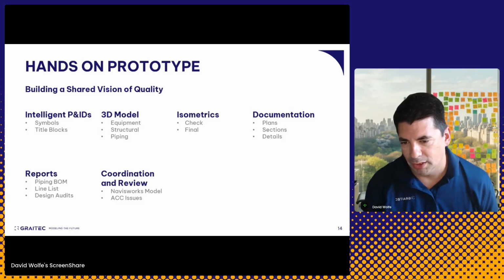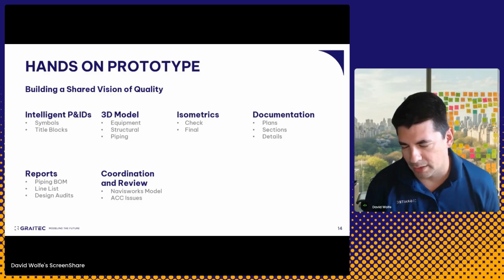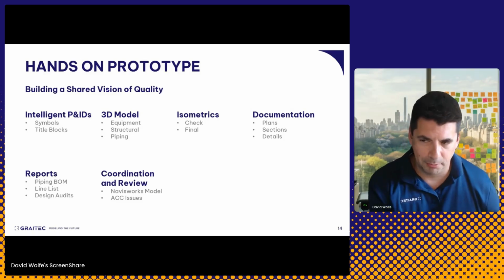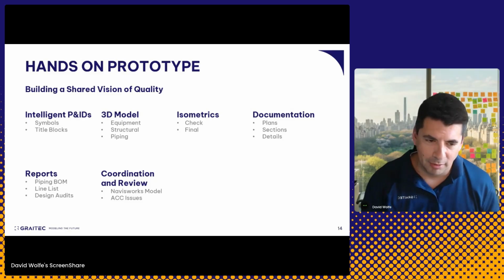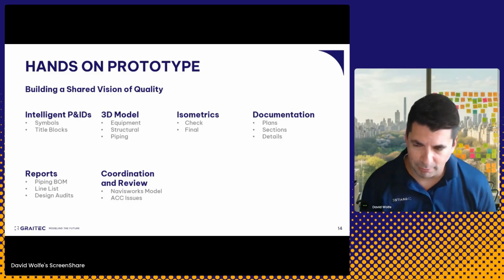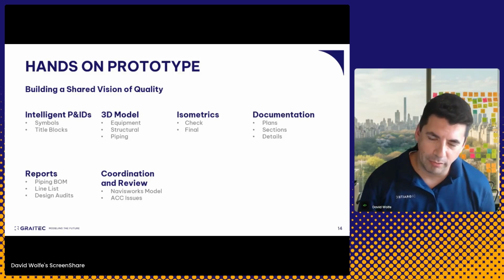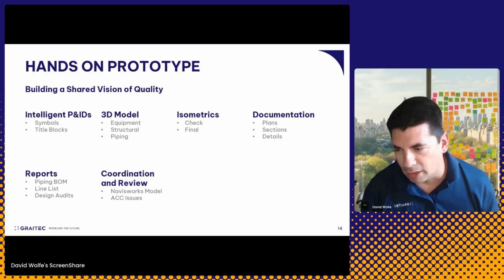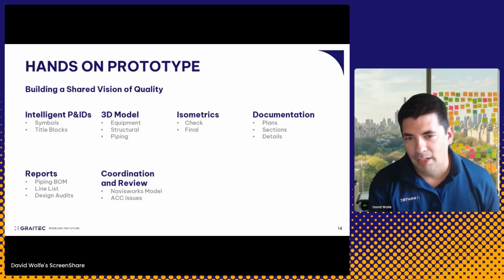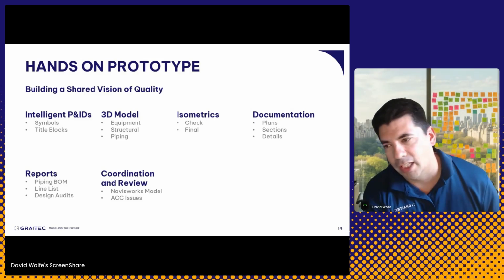You've had the training, but you need kind of a test project before you try to issue a real project, right? Like I mentioned, the first time we do anything is always rough. So we'd much rather have a rough hands-on prototype and walk through some of those issues and hit our head on the wall during that space than do it when there's a real project deadline coming up.